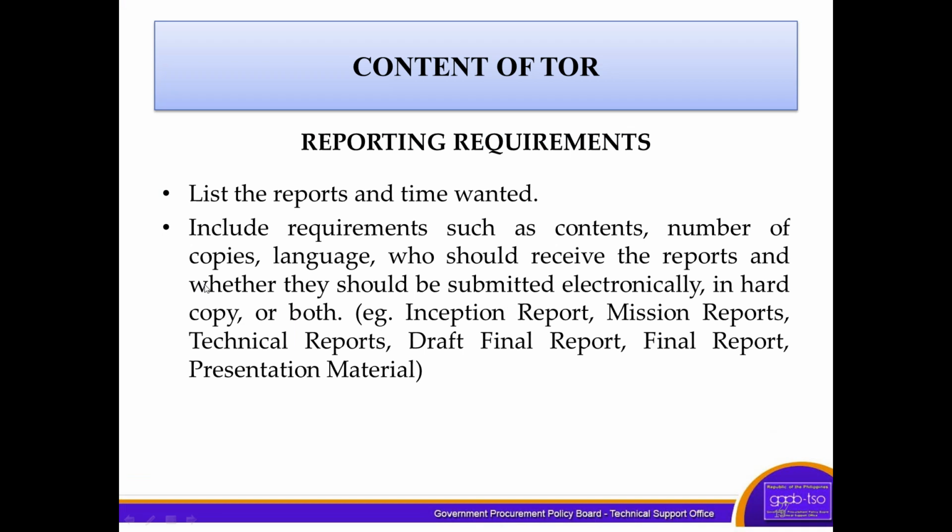Include requirements such as contents, number of copies, language, who should receive the reports, and whether they should be submitted electronically, in hard copy, or both. Examples are the inception report, mission reports, technical reports, draft final report, and the presentation material.